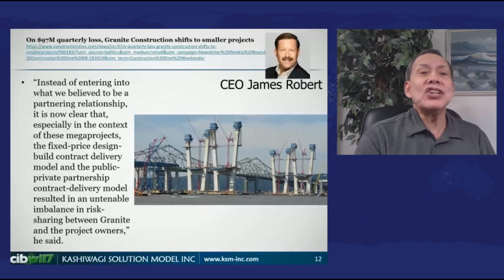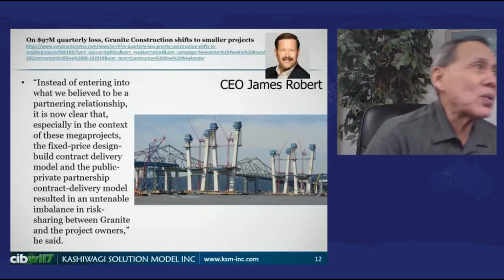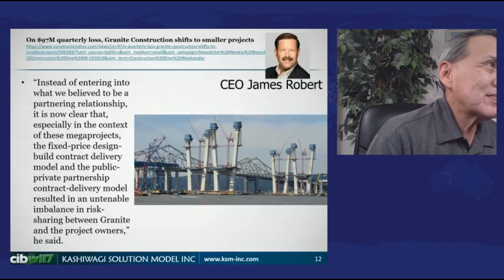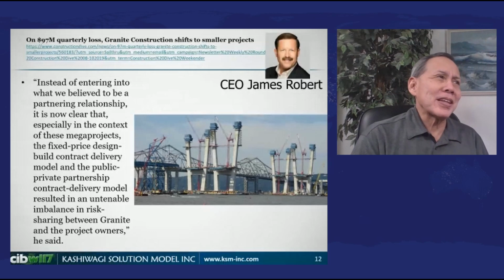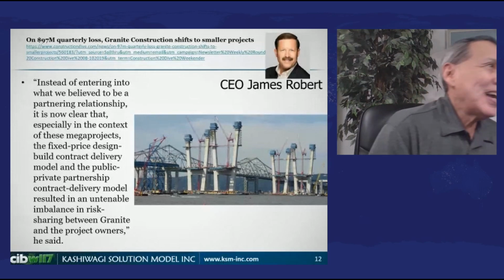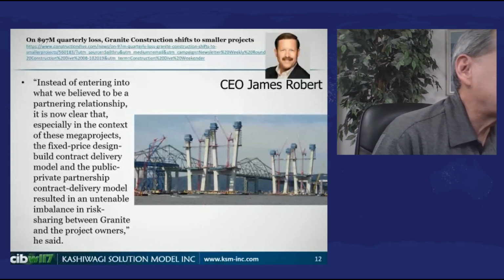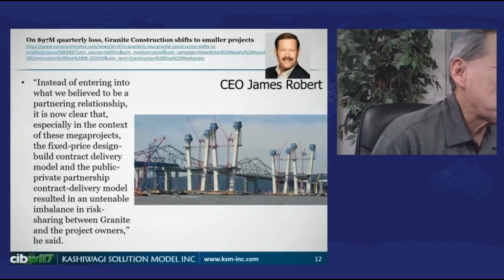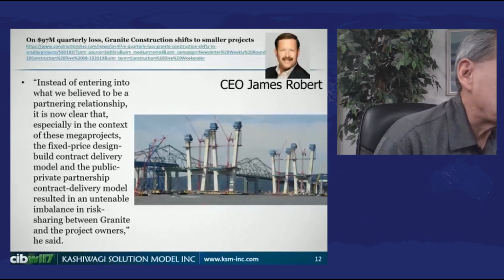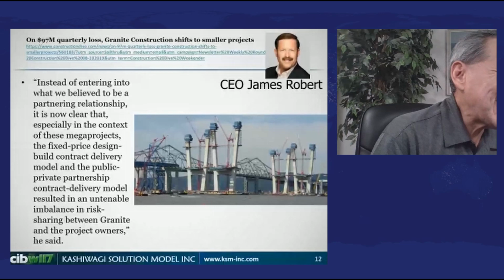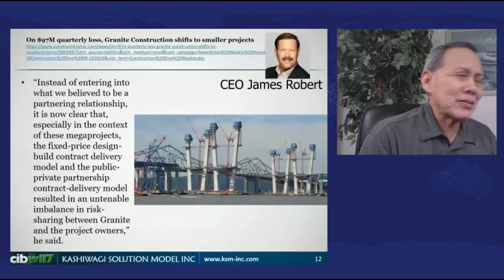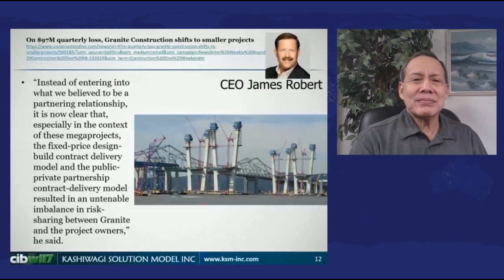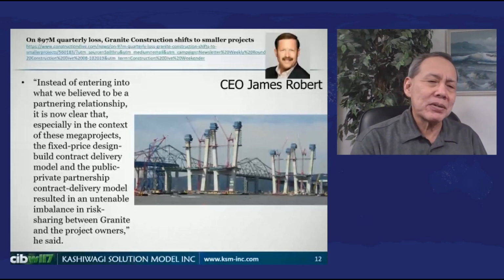And what the new CEO said is, we're done with that. Instead of entering into what we believe to be a partnering relationship, it is now clear that, especially in the context of these mega projects, the fixed price design build contract delivery model and the public-private partnership contract delivery model resulted in an untenable imbalance of risk sharing between Granite and project owners. They're not going to do this anymore.